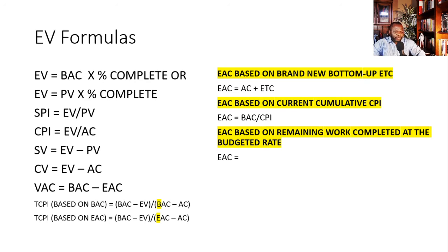All right. So let me give you a clue. Let's use the pointer for a second. All EAC formulas pretty much stem back to this original one. If you look at my brain dump video, you see I break this down into even more granular detail, but it's all anchored back to EAC equals AC plus ETC. That's really the overarching formula.